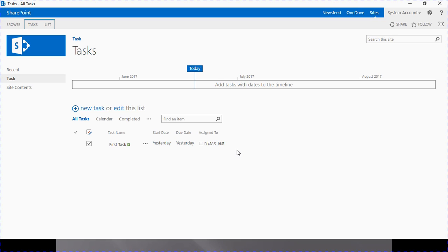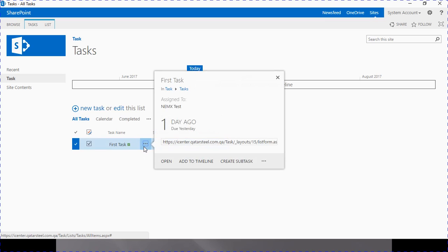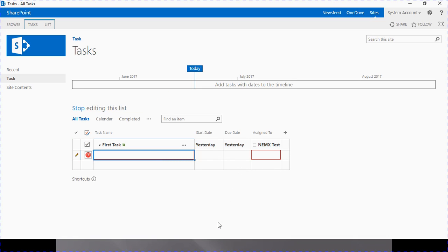Now we move to our next topic: creating subtasks. This is a new feature introduced in SharePoint 2013 onwards — subtask creation under a main task. When you click on the ellipsis next to a task name, you get an option to create a subtask. Once you select that option, you are immediately switched to a datasheet view, now called 'Quick Edit' view. An empty row is inserted under the item for which you selected to create a subtask.